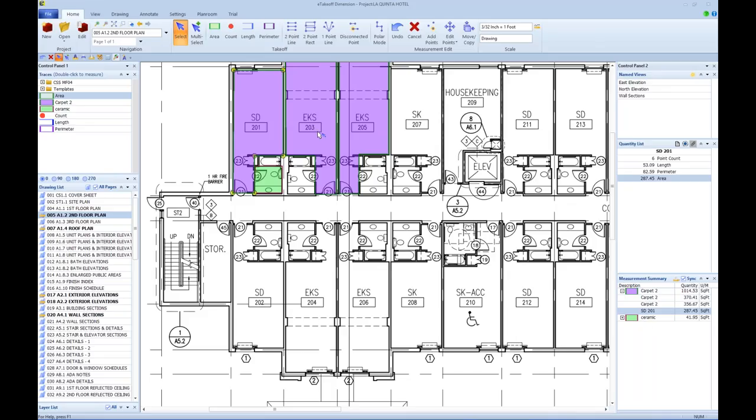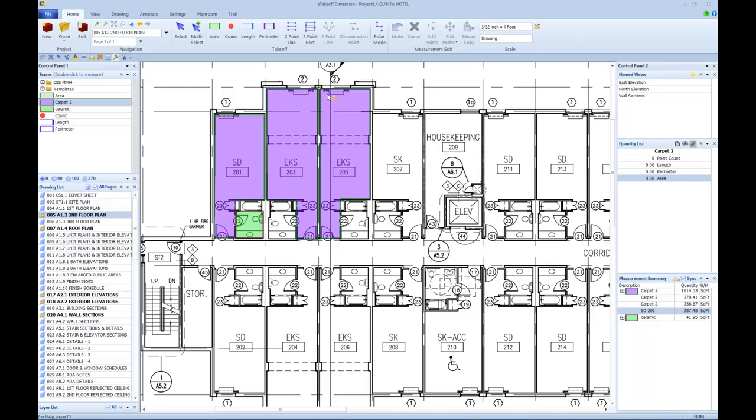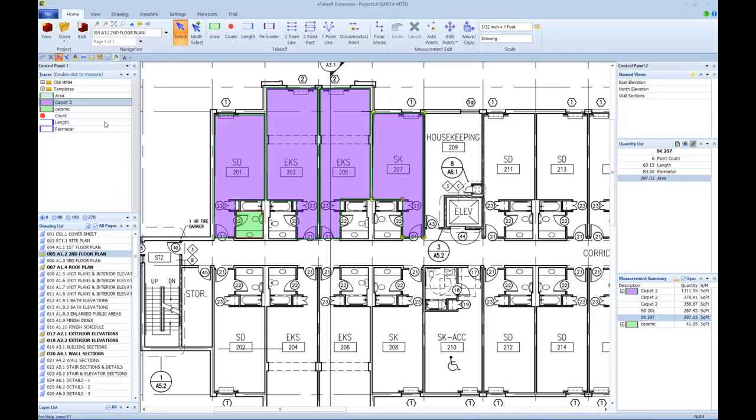And as I'm going along measuring, I can do that as I go. So for example, if I do this measurement, boom, boom, boom, hit the D key right now, label it as SK 207, enter, enter again to save that, and now I've got those labeled. So pretty simple. You start measuring. You can use these if you want to name them as you go. You could use the templates that are here. You could actually start out by creating your own set of templates if you wanted to.